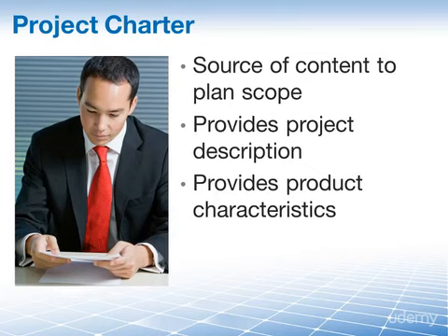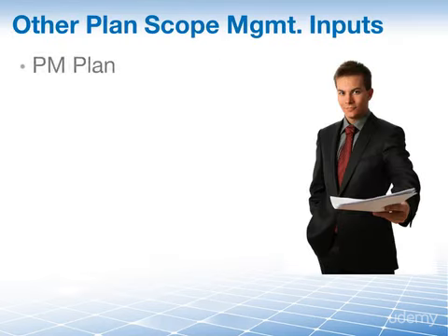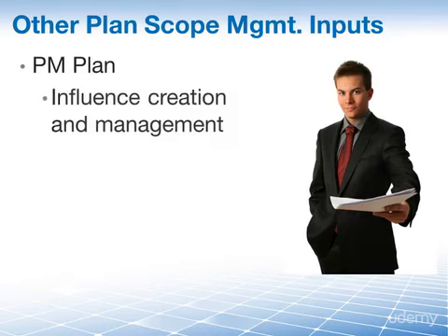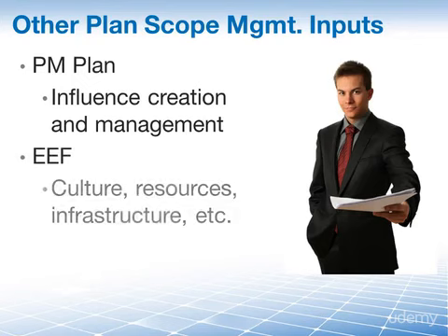Now let's take a look at the other inputs to plan scope management. The project management plan and any of its subsidiary plans will influence how we create the scope and will help determine how we plan and manage project scope throughout the life of the project. The enterprise environmental factors can influence the plan and include information on organizational culture, infrastructure, resources, and marketplace conditions, and any other factors that might impact how we plan scope management.